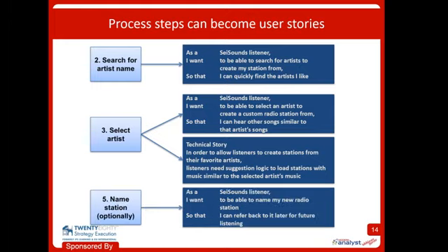Okay, and then I have one more example for you here. This is another step in that same process flow, and yet another user story came out of it. But what I've done here is said, okay, we were at that epic level. It's not to say that you couldn't get from epic down to these stories. You probably would come up with some of them. But by going the process flow way and breaking out what are the steps in my process, I'm giving you a way to think about each step uniquely, which will help you miss fewer user stories, is how I would put it. Okay?